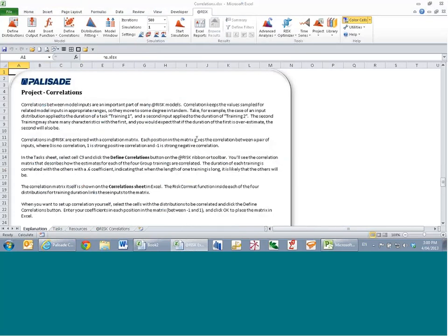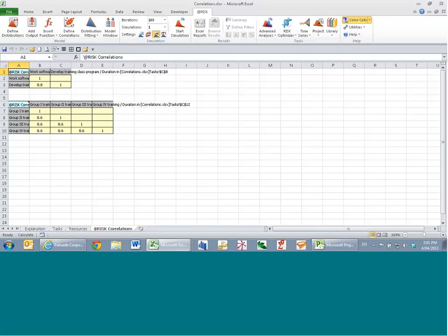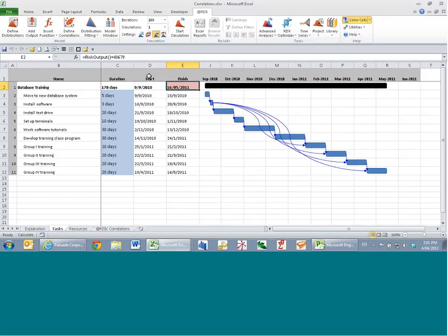It will be very common for a lot of your tasks, be they measured by start date or duration, to be correlated. The same sorts of things that will make a particular task take longer, such as environmental conditions, workforce skill level, and just simply the ability of your project manager to keep things going, will mean that multiple tasks will either all take longer or all be finished earlier. What I've just said in that wordy description is essentially that they need to have a correlation structure.